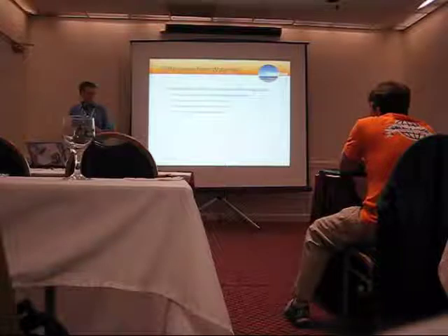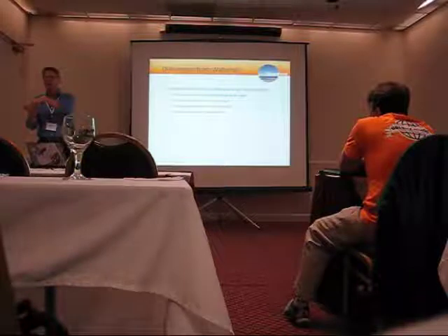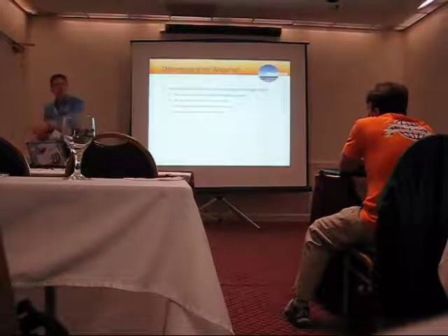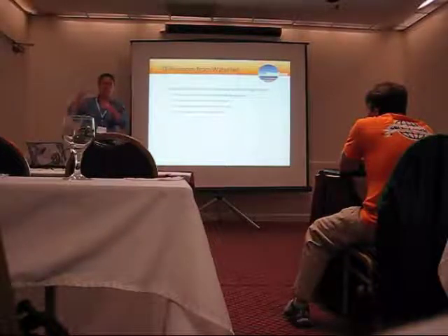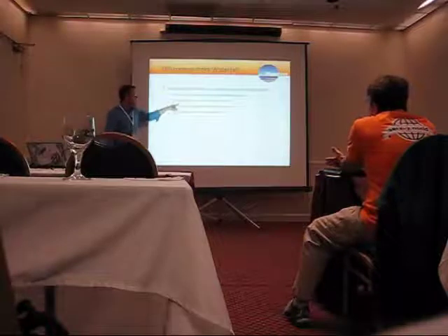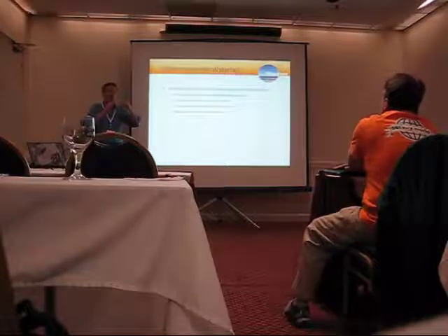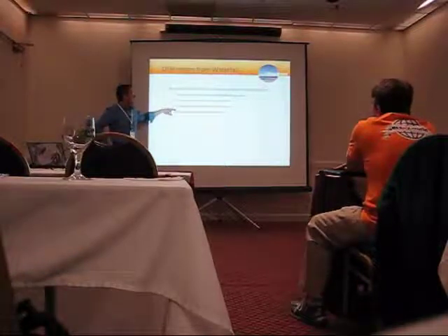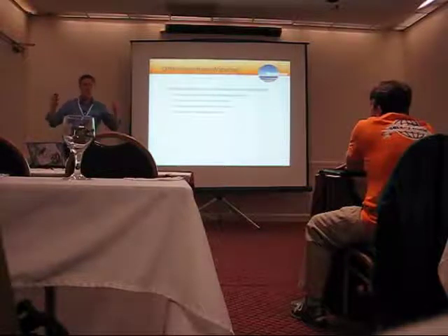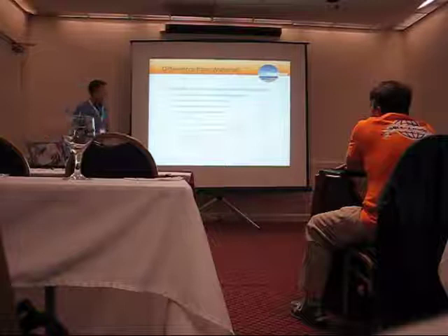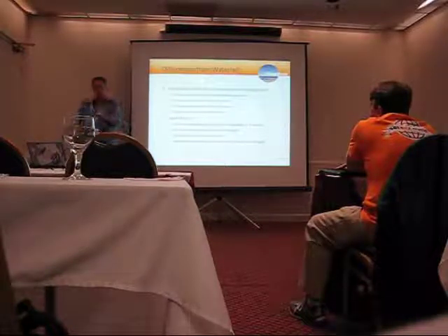The activities are typically organized as linear processes, which means that developers finish their coding on a particular module, sometimes a very large module, and then they throw it over the fence to the QA folks, who throw it over the fence and it moves downstream, and it's a very linear process. Now, we still see this linear mechanism in Agile, but it's a very short line, and it actually occurs simultaneously as a lot of other things are occurring. Activities are organized over linear phases, and the idea is we want to minimize variance from the plan. The plan is the guide. Agile, or Scrum, we're going to use these terms intermittently. Agile is the philosophy. Scrum is an implementation.